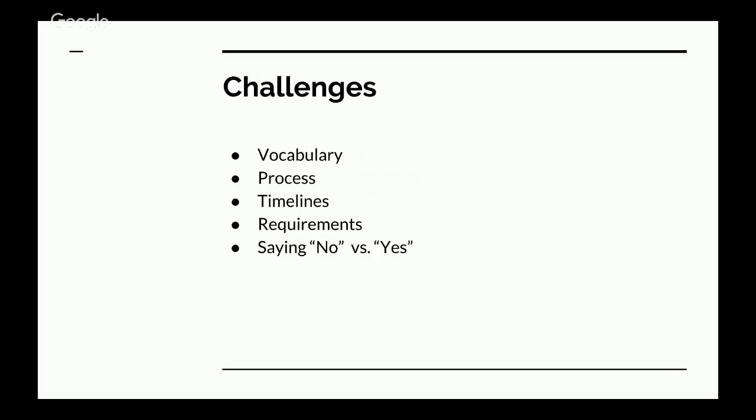The last thing was requirements. Or not the last thing, but one of the things is requirements. Like I had mentioned before, we had 5 partners involved in this project. The requirements that were handed to us at the beginning of the project were not necessarily the requirements halfway through the project. Once the product becomes unveiled and it becomes clear what kind of flexibility they're dealing with, they see that maybe some design elements don't work so well together, and the clients start to say, oh, we got to change this, this, and that. And then we got to change that, change this, and they seem like little things, but they build up. And so as your requirements change, even though the overall requirement didn't change, the specifics did.